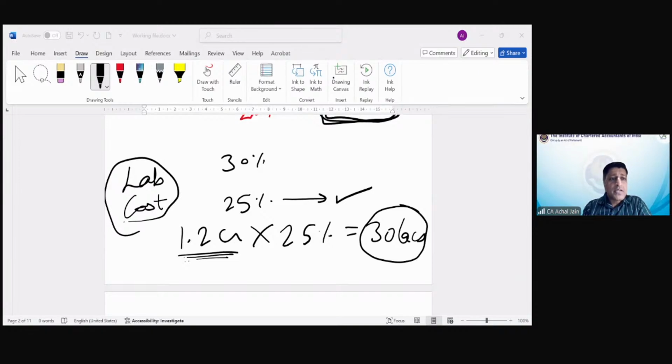So I think Anirudh had a query. Anirudh is saying in the contract, the customer agreed to reimburse the contractor for the increased cost of material and labor only to the extent of 30 and 20%. The rest will be the amount which the contractor will have to bear. That will be his loss, or you can say a cut down on his margins.